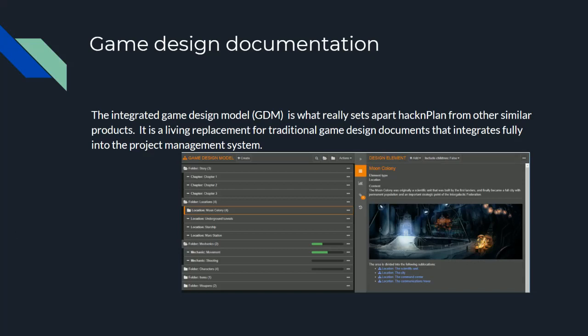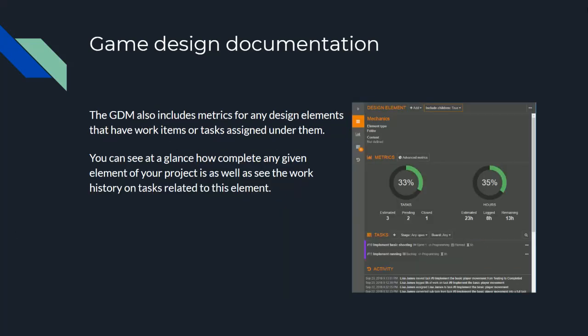The game design model is also a key part of the metrics and activity tracking that HackNPlan provides. As you can see here in the image, any design elements that have work items or tasks already assigned under them will display a percentage of completion as well as task status for that design element. This can be used very easily to see what is holding up a specific portion of your game design or what parts are nearly ready for release if you have an upcoming demo, for example.